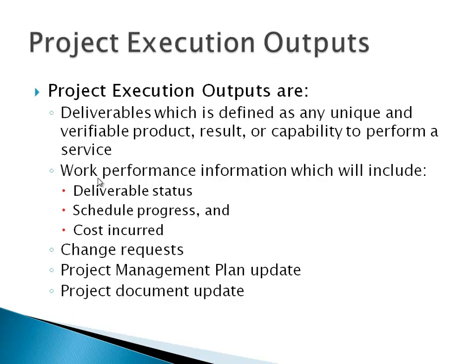Work performance information, which will include the deliverable status, schedule progress, and cost incurred. Also, we expect to have change requests, project management plan updates, and project document updates. And those will be the results of the execution of the project.